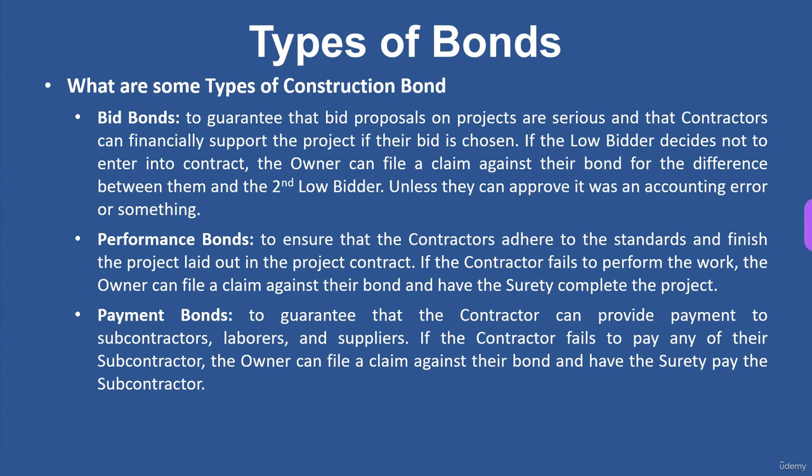But when the contractor defaults on their project, they go bankrupt, somebody's got to finish the project. You don't want a building halfway complete, right? So that's what the performance bond does, the surety who issues a bond will then hire another contractor to finish it. It happens. I can't say it happens that often, but it does happen. So those are another one of the bonds that are required when the owner wants to issue the contract, so that they can guarantee that their project will get finished. It's basically another layer of insurance.